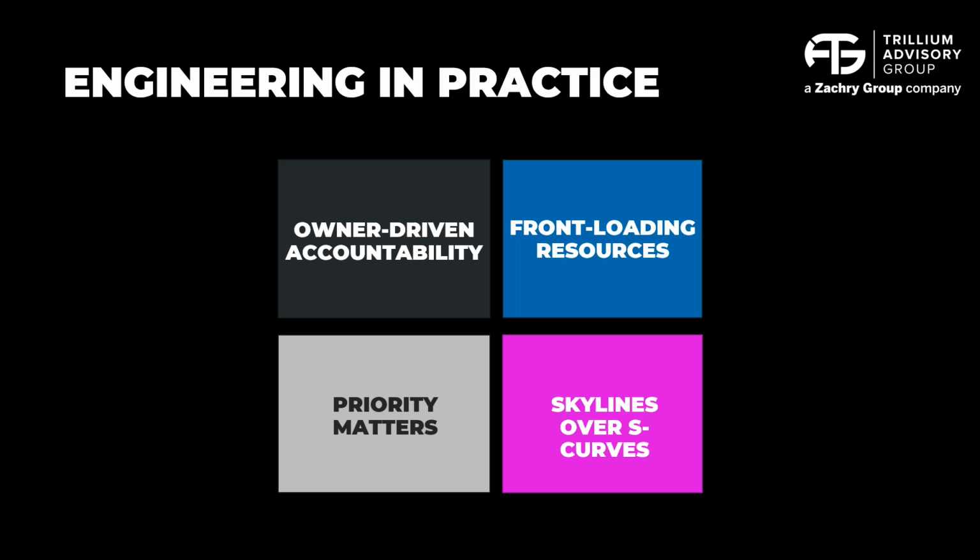As we're getting more and more familiar with AWP, the path of construction really sets out the overall drive and key areas that engineering, procurement, construction, and ultimately commissioning need to work on. In order to achieve that, I suggest the project becomes mindful of focused EWP completion as opposed to gross engineering document progress. Maybe this is elementary to most folks, but it's turned out to be a very powerful tool. Consider using skylines for your EWPs rather than S-curves to highlight out of sequence progress and late or missed EWPs. So Tanis, if you'll go to the next slide.